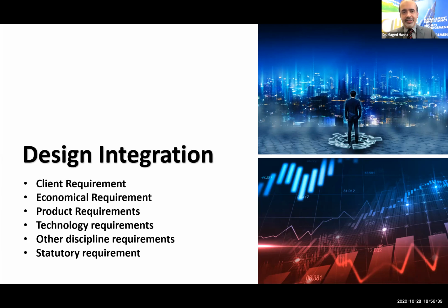They do the comments, they do another design for, let's say, the mechanical work, and they submit it, and it gets rejected. So they are not aware of the authority's requirements, the published standards and specifications for the design in different disciplines, and they get to know them how? When the drawing gets rejected, they find out what is wrong, and then it is corrected. You can see, this is not what we talk about in integration. What we talk about in integration is innovation. And to be innovative, you need to be proactive. If you want to be proactive, I need to bring all the requirements together, think outside of the box from the beginning in order to achieve design success.